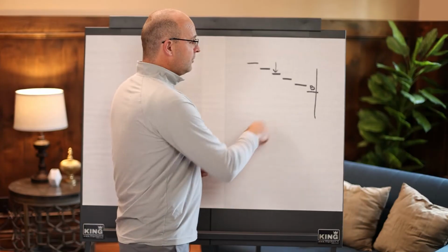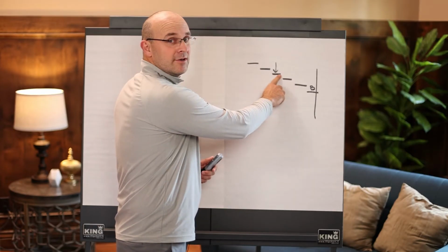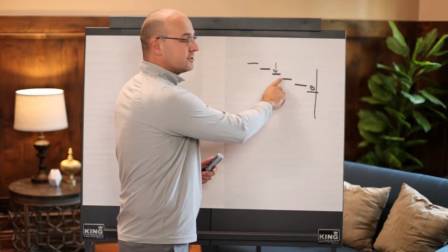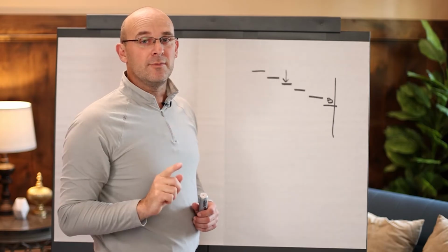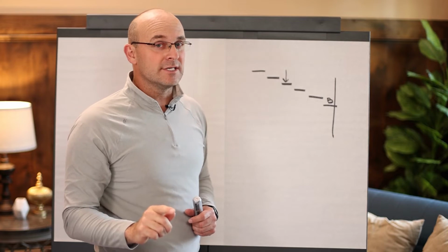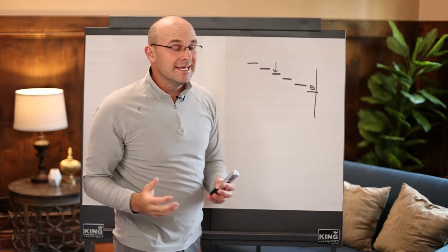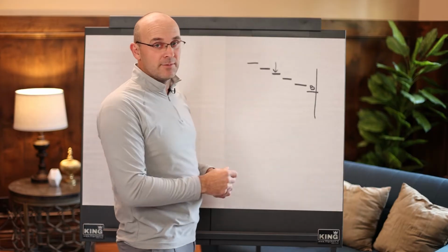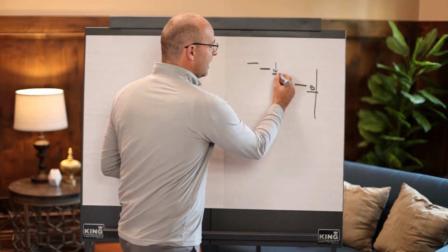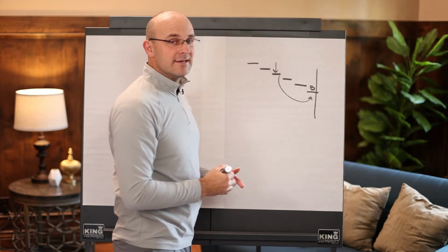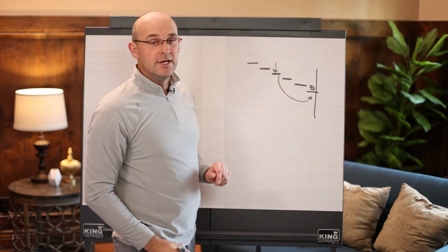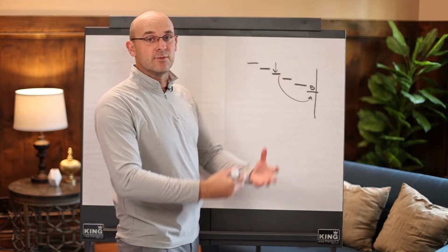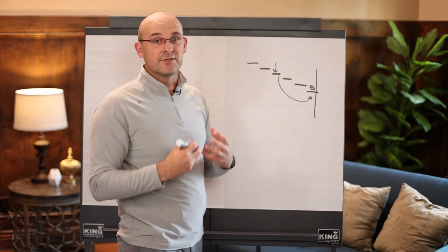Number one, if you put the buffers here, then the second activity will not start on time, which means that you're automatically delaying your project unnecessarily, meaning it's not inevitable, meaning that you're doing it simply from bad practices. You want the buffers out of the activities and at the end so that they're starting on time so that we can prevent any delays within the project team or the internal team itself.